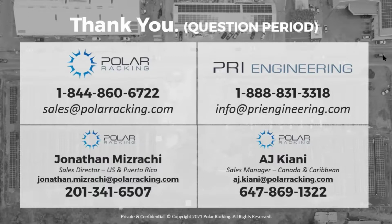And I will say that if your project has gone to the point where you're using that as a last resort, you definitely are going to want to circle back, verify your QC process, verify your contractor's installation process, because there's probably some challenges there that could probably be corrected for future projects, which would eliminate the need for those risky foundation types.